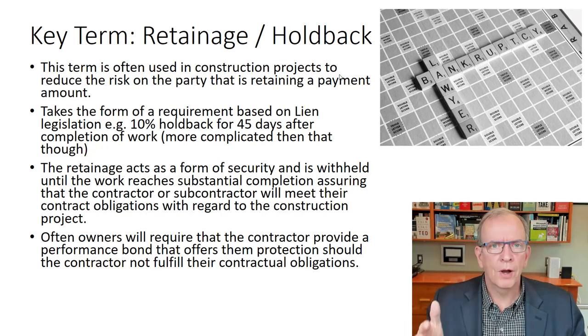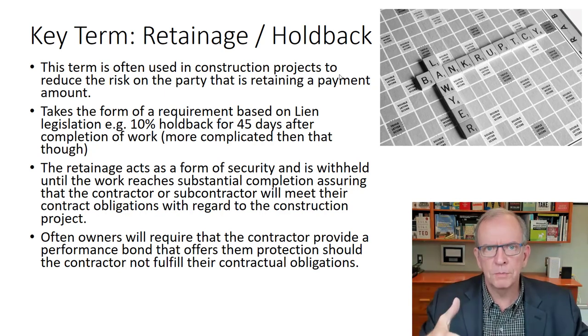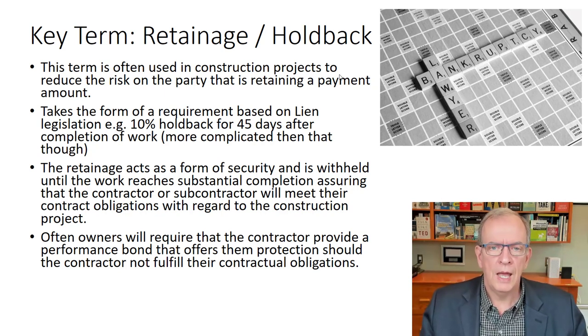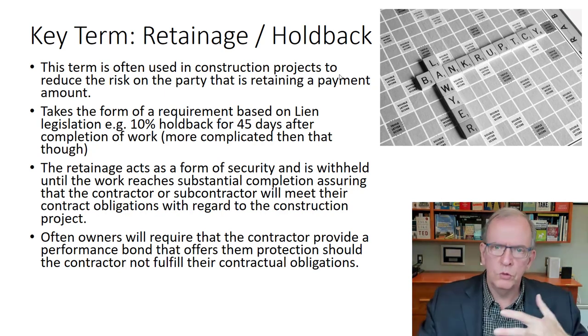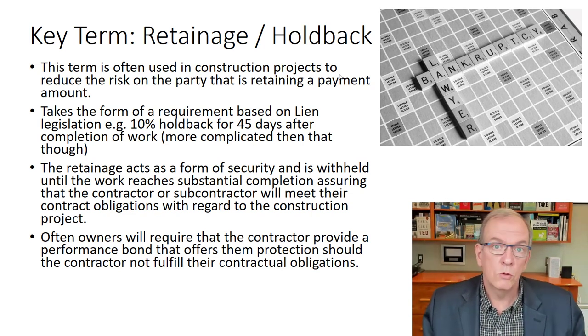to the end of the project. And there are different requirements of so many days to hold back after the work is completed to give people time if they need to place a lien on the property. A lien prevents somebody from selling the property during that time period. And that trust is held there to cover, hopefully, those amounts that are in dispute. And those are legal requirements that are supposed to be done in construction projects.